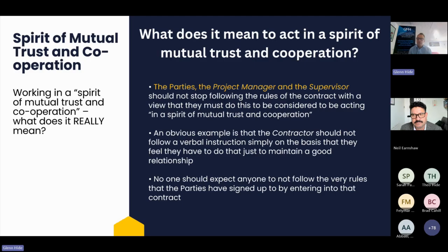If you had a CE rejected, you will have known on your program how long it's taken you, although it was rejected as a compensation event. So you should still be able to go back if an adjudicator says, well, actually, that was a CE. If you know it's taken you 4 weeks, but it was rejected as a CE, you should be able to go back to that program and prove it. At the point you issued the program, you might have projected it was going to be 4 weeks. Ideally, it would still be a forecast. That one would be a little bit more tricky to unpick, but the principle is still the same.